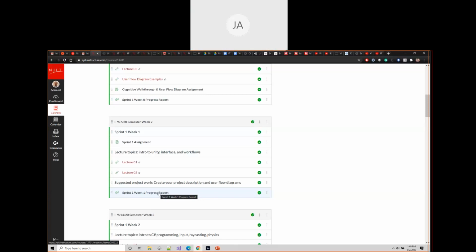Okay, let me write that down. Yeah. So for every feature you describe that you're going to build, you need either a reduced one or a backup, an emergency plan in case things go bad. Understood.